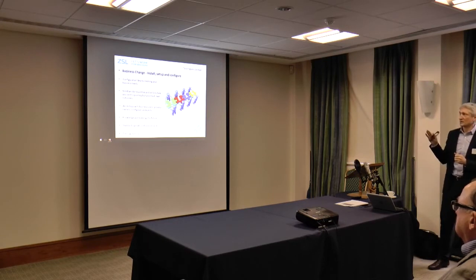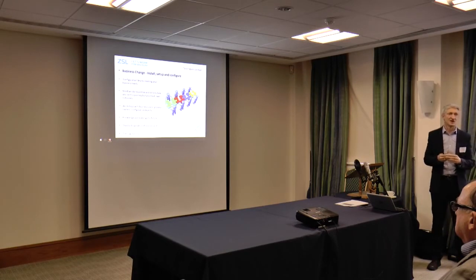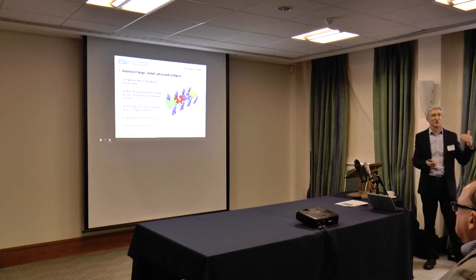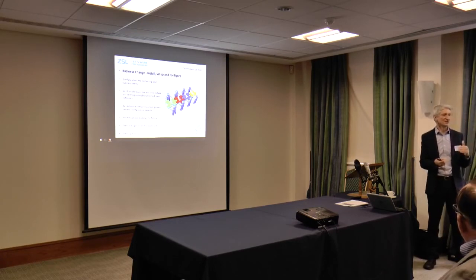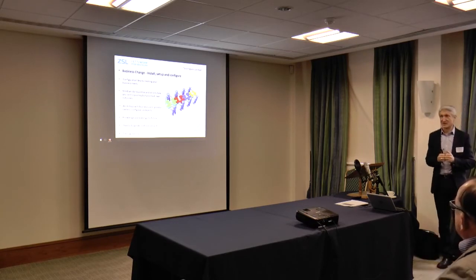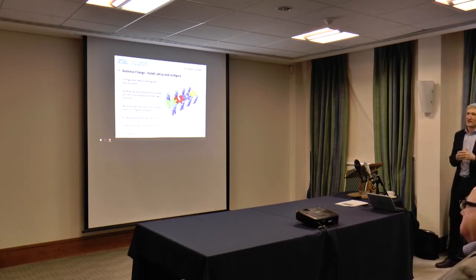I think also be aware of the knowledge and what you're learning. So we, as part of this process, put together the users, the IT configuration team, the vendor, and the business processes. So back to my 2B processes again. We worked through those in detail, and we had a scribe. The project manager did it. She wrote down every single point of configuration that we did and we discussed, and we built configuration manuals. So we were starting to capture that knowledge so that we had not only it in the heads of the people who were in the room at the time, but we had some evidence and something tangible at the end, so that when we said, why did we do that, or how about that, we had a bit more knowledge of it.